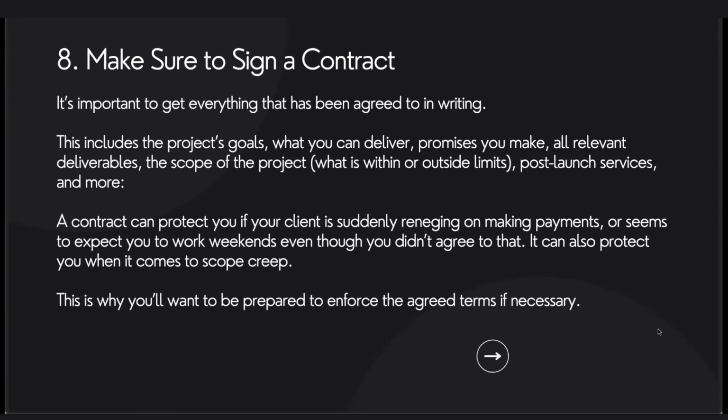But it seemed like the agency didn't have a contract. The agency never set the deliverables, goals, scope of work, limits, things like that. And they ended up telling us, well, I had to pay the second final revision out of my pocket. When it hurts you in the pocket, I guess you learn that way, right? The problem with this agency is that they said, I'm paying for the second one. Again, a rarity, but I can guarantee you next time they're not going to do that.